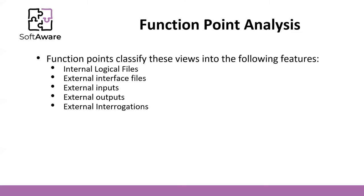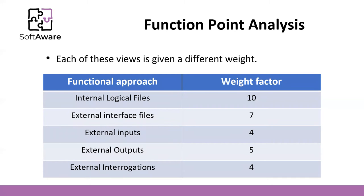To use function points, we classify requirements into the following features: internal logical files, external interface files, external inputs, external outputs, and external interrogations. For each feature, a different weight factor is given. Internal logical files have a weight factor of 10, external interface files 7, external inputs 4, external outputs 5, and external interrogations 4.